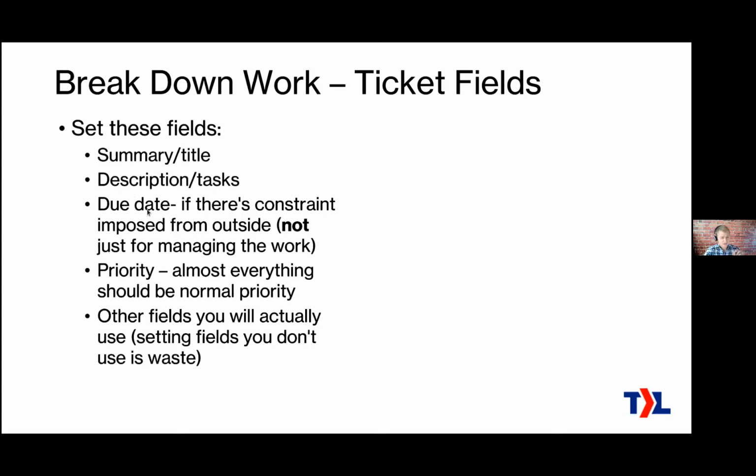The due date, a lot of confusion about the due date. Okay, the due date is if there's a constraint imposed from outside. Some people have been using due dates to try to manage the work, to say, in order to keep this project moving forward, here are the due dates that we need to have for that.